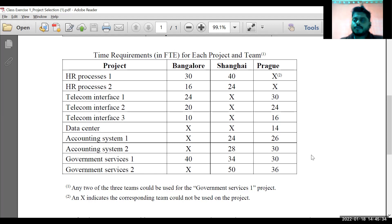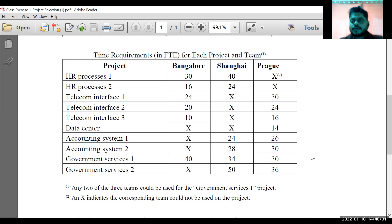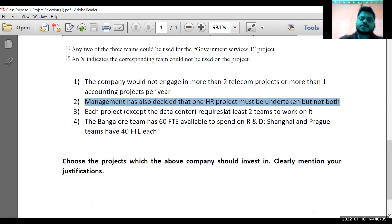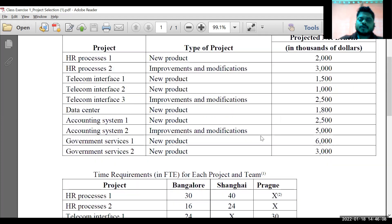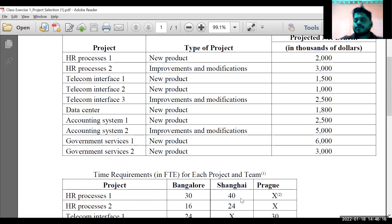About half the groups have written that they have a shortfall of 50 resources but are still going to select that project. That is not possible in reality unless you have a backup plan — such as you can hire within one month, offer letters have gone out, they are joining within one or two months, and that cost has already been calculated. The net benefit figure includes the salary structure of whatever resources are required.